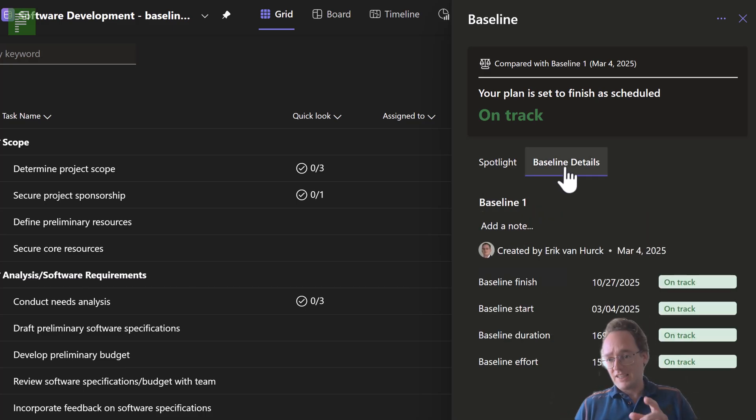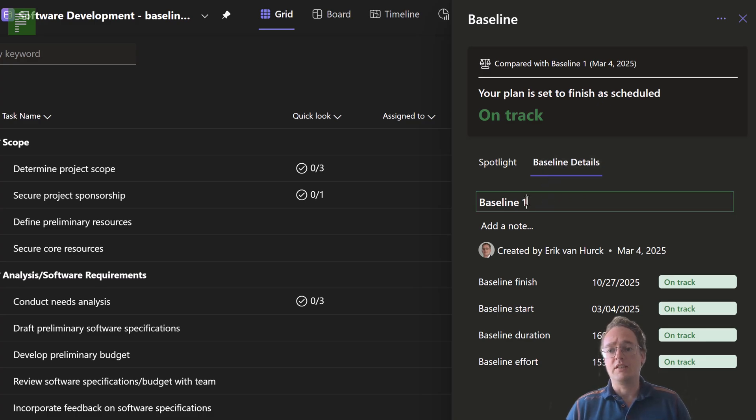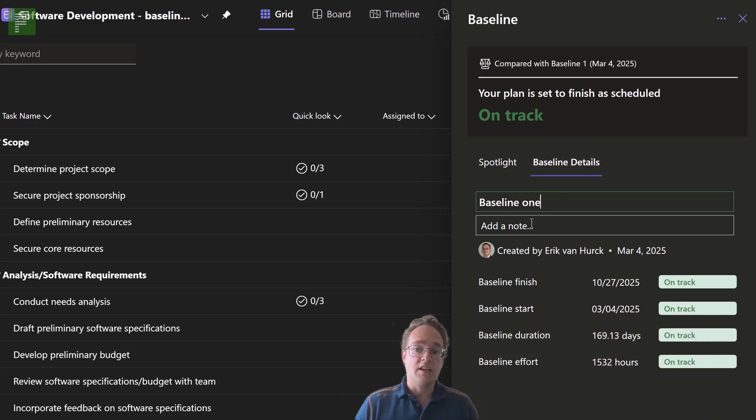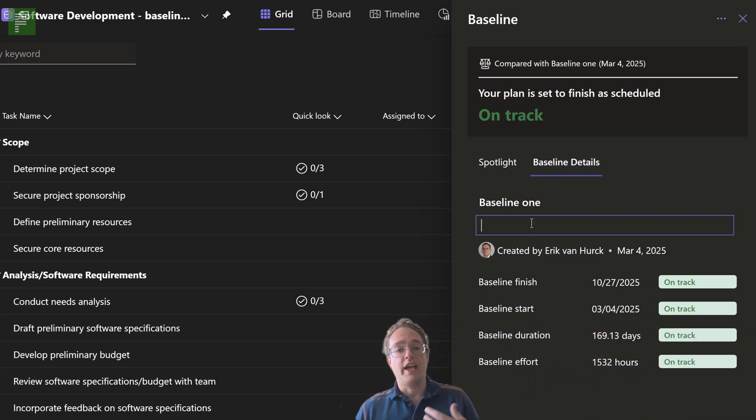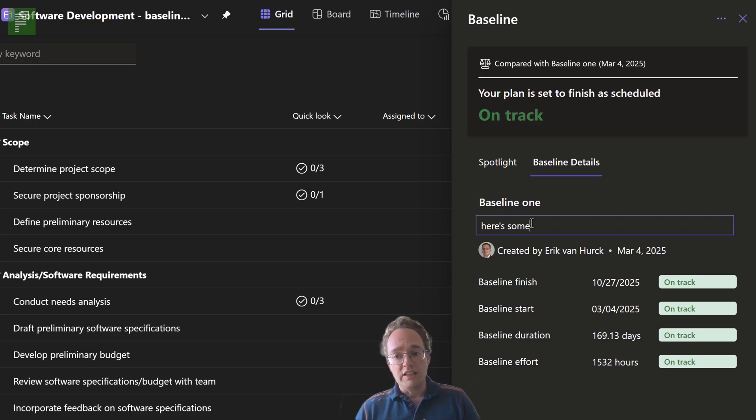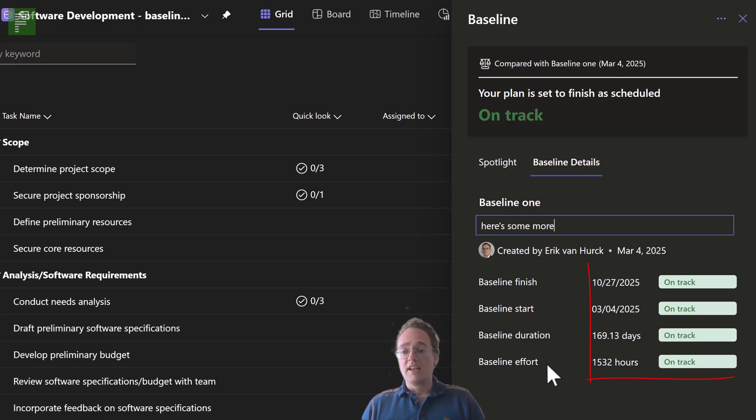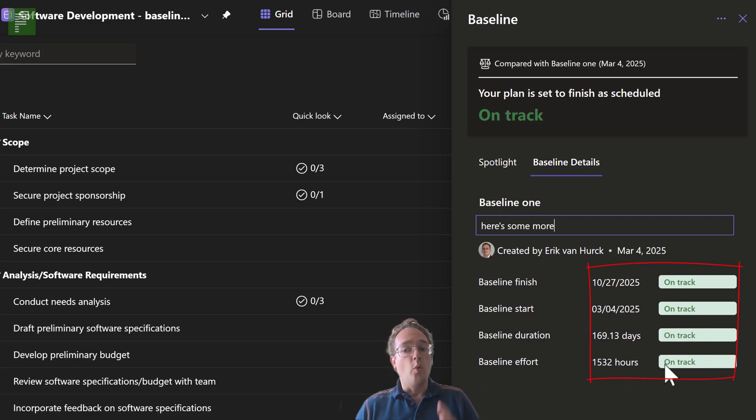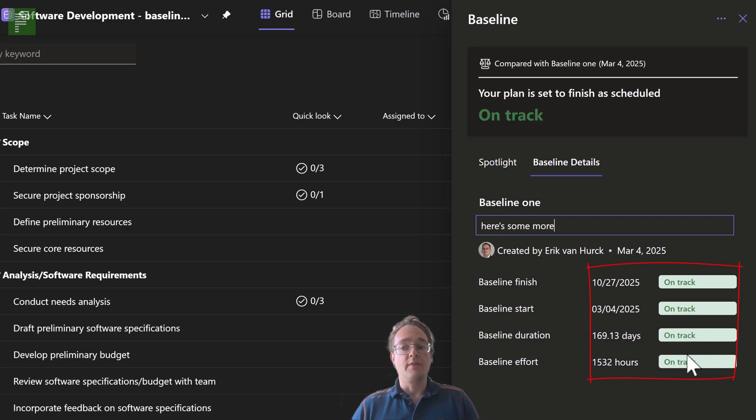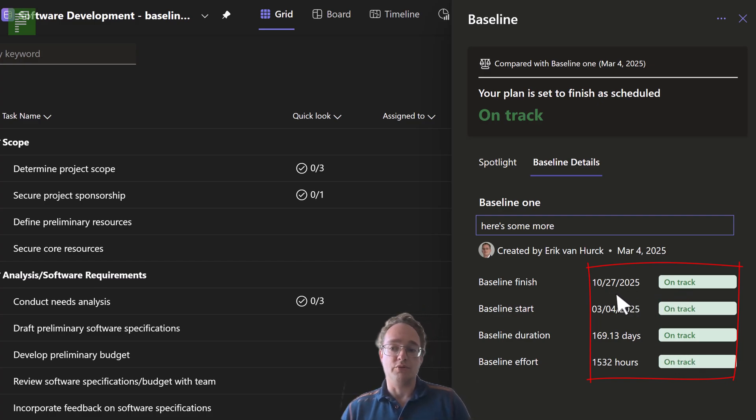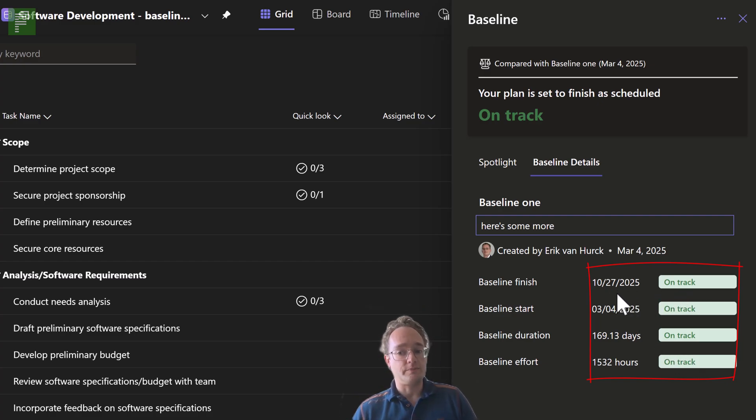Let's take a look at the baseline details because here we can still change the name of the baseline and add a note. But something that you also see happening here is that there is now a baseline finish, start, duration, and effort with a tracker. And that is a very big and welcome improvement on the baseline itself.